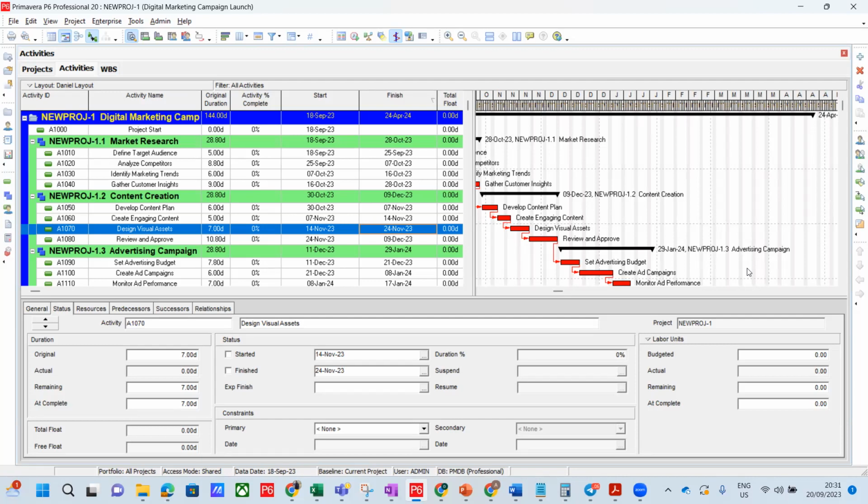And lead is like you're saying, you can say finish to start minus 2 days. So you are saying 2 days before A finishes, B starts. You understand the lead now? That's the lead, -2.